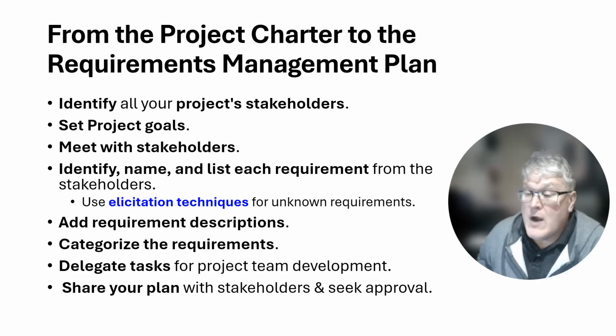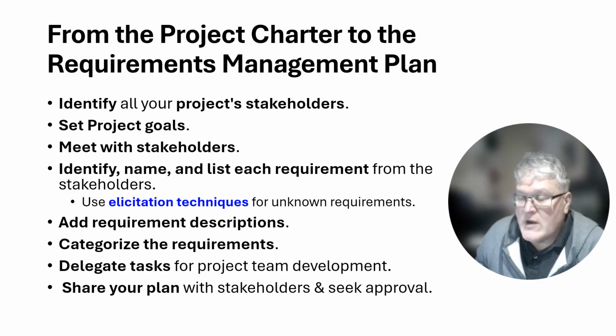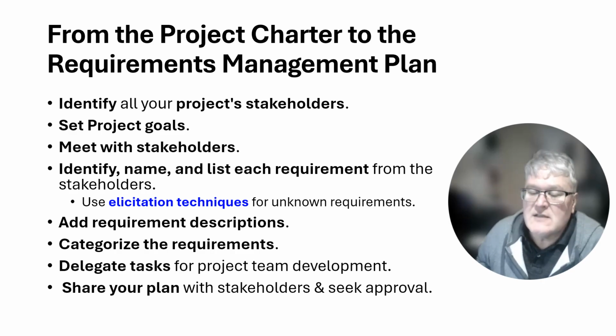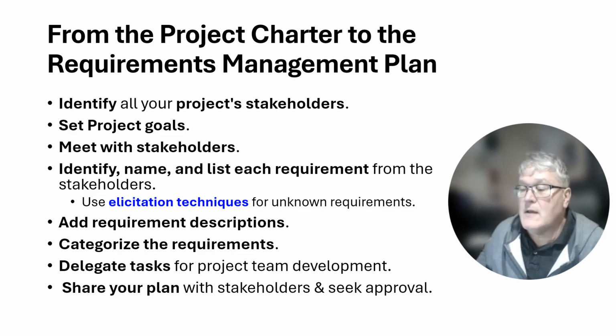You'll add requirements descriptions. You give a categorization. In other words, you may rank them from 1 to 10 of what is required and who is requiring these things. You might delegate tasks for the project team to develop this plan, and you may share your plan with stakeholders and seek their approval once you've got it together.